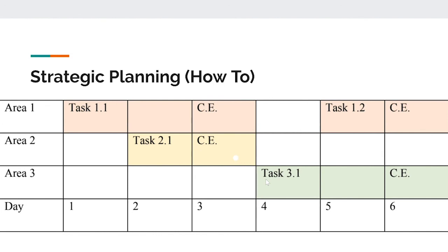What I mean by the relationship between tasks is that one of the ways you can discuss these relationships is by the use of critical path items, or CPIs. It's a term that NASA uses, and it's actually quite useful. So let's say we have task 3.1 here. Before we can start task 3.1, we need to finish 2.1 and 1.1. That is to say, tasks 1.1 and 2.1 are critical path items to 3.1, because without them, we cannot continue along our path. They are critical, if you will. And then 1.2 is just hanging out here.